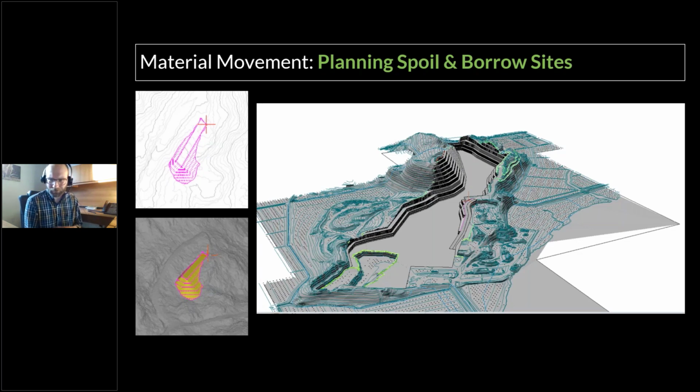And here on the right, it's an aggregate mine, so it's a proper mine, but the concept is still the same. A mine is just a big borrow site where you're pulling material from the earth. So as Jeremy said, you can get really complex and talk about staging different phases and have your whole design have a time component in it, where you're looking at phase 1, phase 2, phase 3. You can do that. The requirements of your project will dictate whether or not that complexity is appropriate.